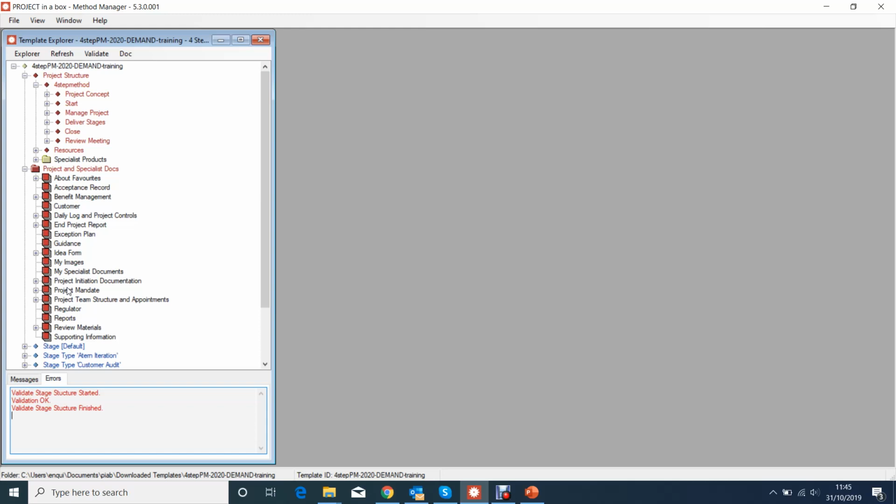What you absolutely should do is upload it to the server, create a test project, and go through and make sure it's as you expect it to be, that all the materials are there, that it's accessible with its own name when you create it, and that it's got the reporting set up that you want, and run some reports and make sure those things all work. Very important to do that. Otherwise, you go away and create 100 projects, people start putting things in and they're not right. That's a lot of effort to recreate and correct all those things. So definitely you should always run test projects at the end.